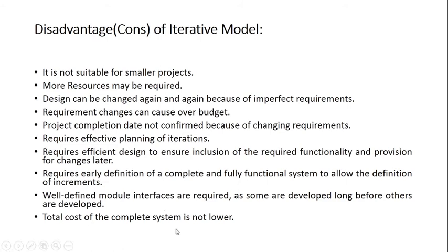The total cost of the complete software is not lower. As I've told you, since you are repeating the steps again and again, you are going to hire an analyst, designer and coder for a long duration, and you have to pay them. The major cost is the salary given to the development team members. Since you are repeating the task, extra cost, effort and time are required.